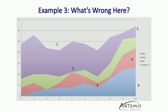Delivering something to our customer is our end goal, and that is how we want to be measuring how we are doing. Number three, we have a dip in the complete — something got pulled back out, marked as not complete, and moved back into a different state. We generally don't like to see things move out of complete. Number four, we have a lot of items that are still incomplete, especially at the end of the sprint — lots of items in build and in design. It's better to have almost everything marked as ready at the end of the sprint rather than in an active state like design or build. Number five, we were still adding more work to the sprint even though it was very clear we were not going to deliver what we'd already committed to — adding more work even late in the sprint is an anti-pattern we want to address.